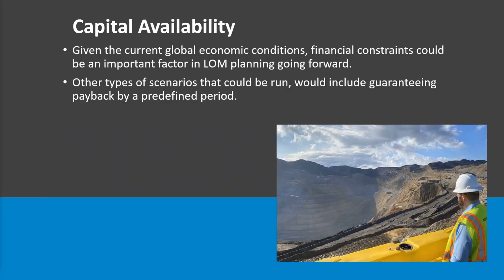Given the current global economy and current interest rates, these financial constraints to generate secondary mine plans with different initial cash flows could become very important to your clients — either because the capital may not be there, or they may be looking at allocating capital in different places. Other scenarios you could run include guaranteeing payback within a certain period — loading in land costs, permitting costs, and saying you need at least zero cash flow by year four or five. You could also load multiple mines into the same model with a budget of say $500 million in CapEx and ask where you should be spending it across different items at different mines.